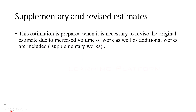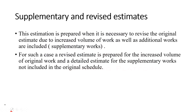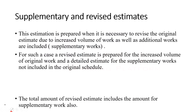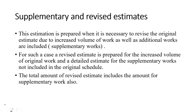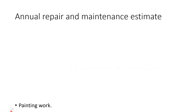A supplementary and revised estimate is prepared when it is necessary to revise the original estimate due to an increased volume of work as well as additional work. A revised estimate is prepared for the increased volume of the original work, and a detailed estimate is prepared for the supplementary work not included in the original schedule. The total amount of the revised estimate includes the amount for supplementary work.